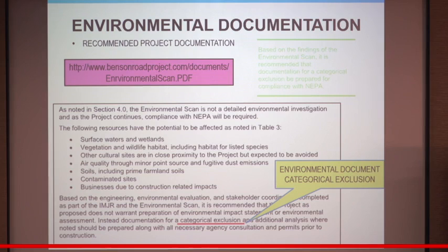We found that we generally had minimal impacts. Most of our impacts stemmed from the loop ramp options needing significant right-of-way outside of the existing right-of-way. That was a concern. Anything outside of the right-of-way had more impacts to wetlands and those types of environmental items. As a study group, we looked at all of the documentation, and for our DOT conveyance on the environmental side and Federal Highway, we're moving through this process now with a categorical exclusion, meaning we had very minimal impacts to resources, which was fantastic.